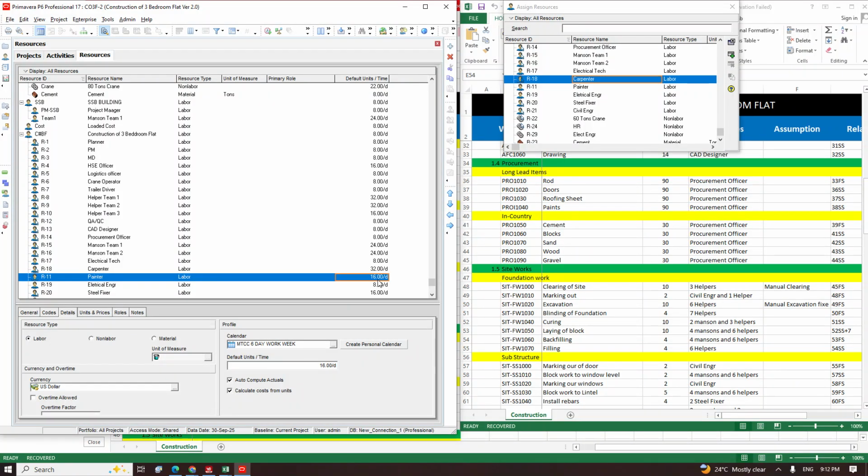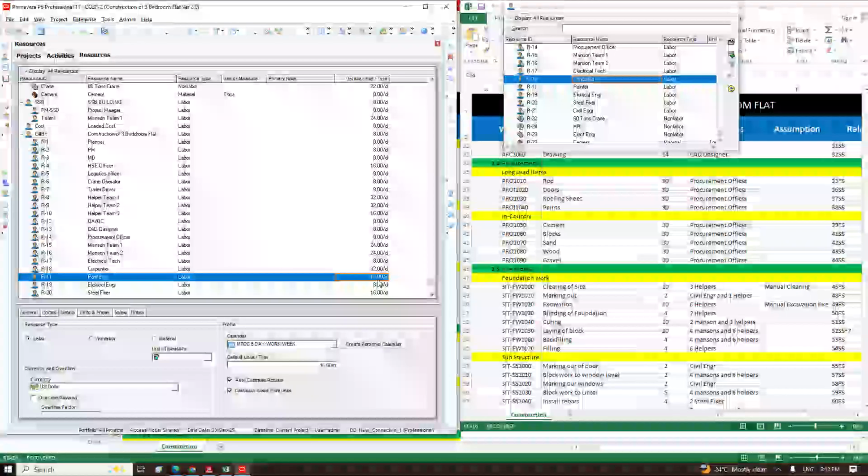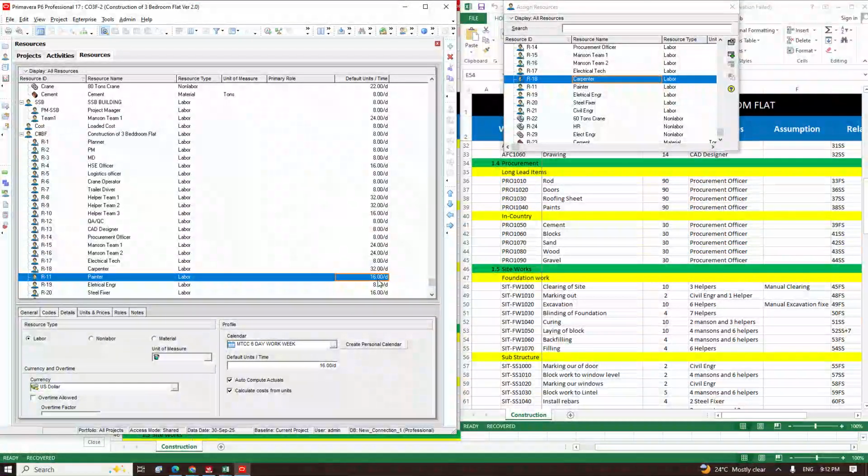Okay, so door installation is a mason's job. Carpenter doesn't come for door installation. Normally these days, what we're using is aluminium door. But if it's going to be a wooden door, yes, a carpenter is needed. But most doors these days are aluminium. I think wooden door is actually phasing out. So that's the assumption here. So you don't need a carpenter. If you just bring in the aluminium door, a mason will just plumb it and put it, and that's all.